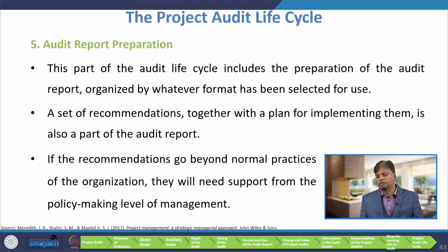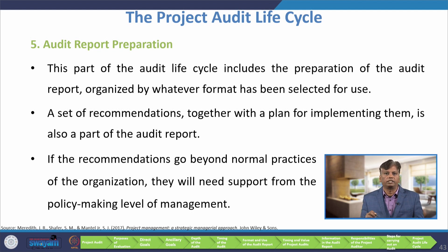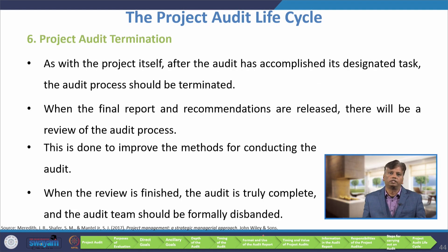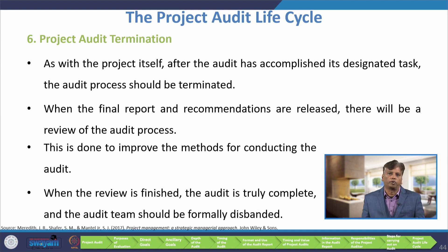The next stage is audit report preparation. This part of the audit life cycle includes the preparation of the audit report organized by whatever format has been selected. A set of recommendations together with a plan for implementing them is also part of the audit report. If the recommendations go beyond normal practices of the organization, they will need support from the policy-making level of management. The last stage is project audit termination. After the audit has accomplished its designated task, the audit process should be terminated. When the final report and recommendations are released, there will be a review of the audit process to improve methods for conducting the audit. When the review is finished, the audit is truly complete and the audit team should be formally disbanded.